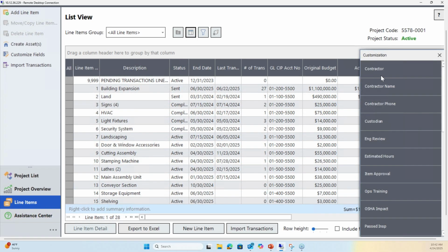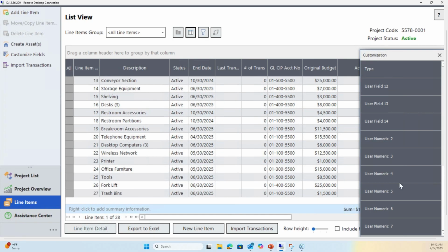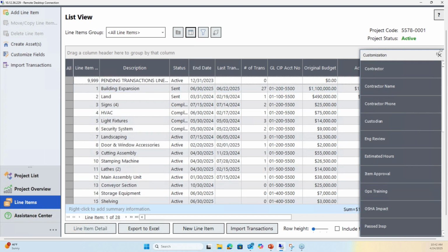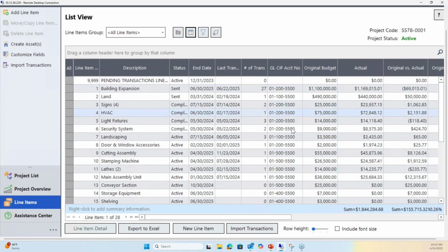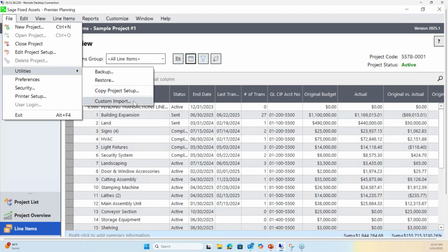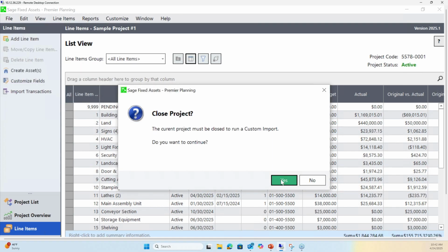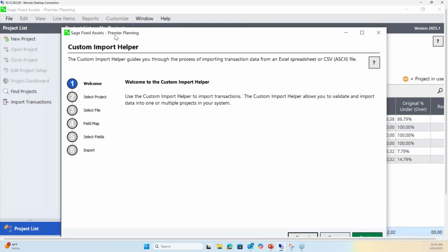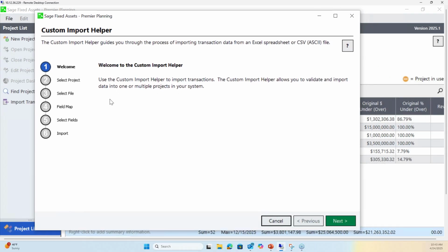And what do you mean by that? So if I go back to my line items, let me go back to my list view. When I go to add a line item, where you have original budget, you don't have to have your line item have its own budget. If at first you just want to put the entire $1 million, as an example, as your project budget, and then put in your line items and work from there and have the transactions just all move up to that,